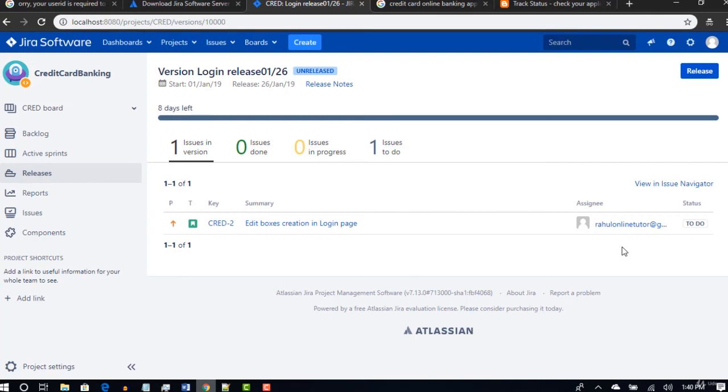Okay, in general, when you don't have tools like this, and you are working with different teams, you have to reach each and every team and ask, are we good for the January 26th release? Are all the stories completed development? You have to check with them. But now, if you provide proper tagging, I can simply click on this release link, and I can see all the user stories going for this release and what their status is.